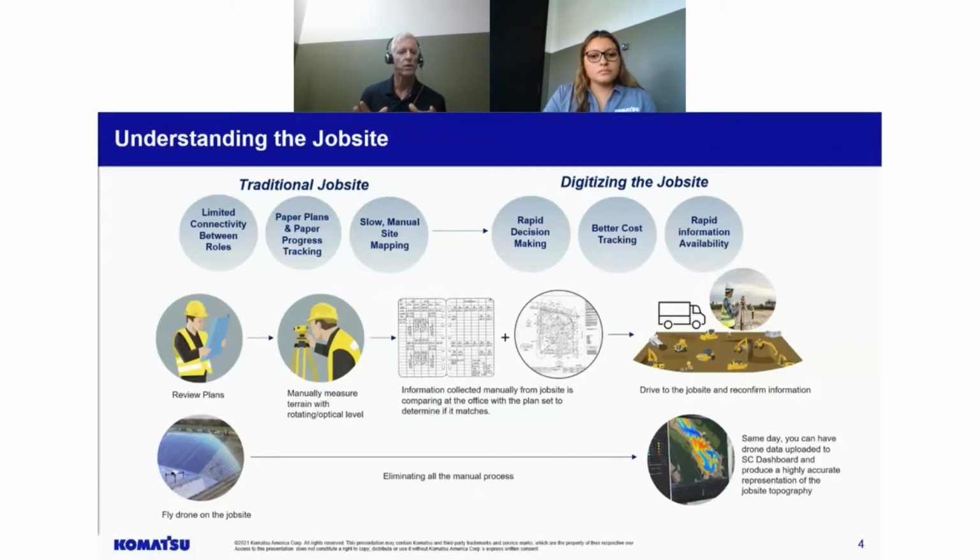I'm going to give you a real world experience that happened to me many moons ago. I designed a commercial subdivision. I needed to get a state permit to have an access to a state route. Topo, everything looked good. Got my permit. When we started construction, there was a utility pole right in the middle of that access. It was a big mistake, big hassle, cost a lot of money. But if I would have had those 3D images, I could have seen that and adjusted accordingly.